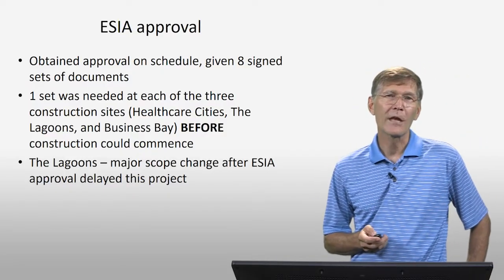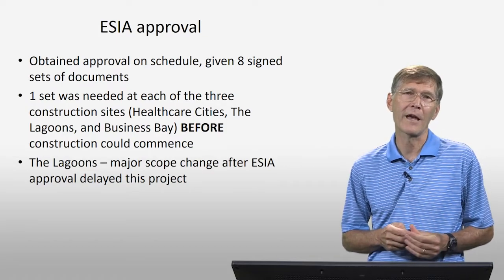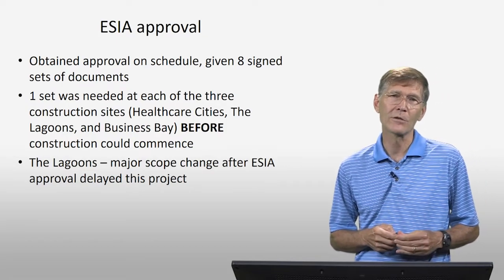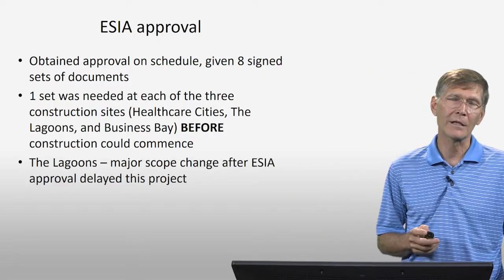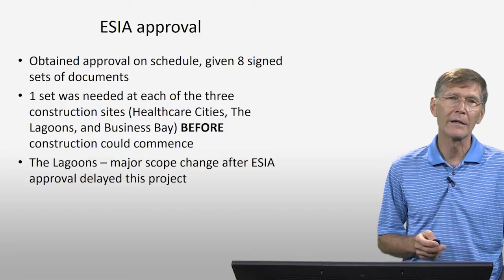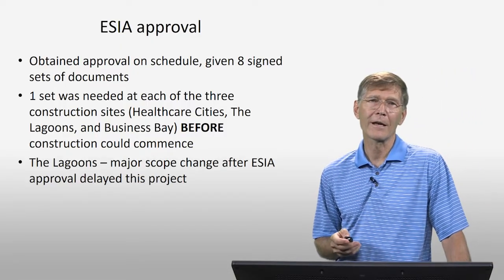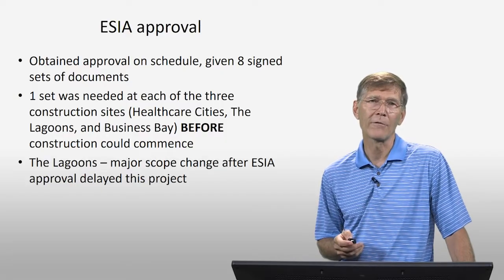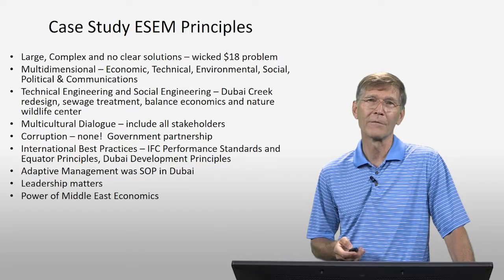And then the lagoons, they had a major scope change after the ESIA. Unfortunately, you don't want that on these projects. You do not want major scope changes, because then you have to go back and get the approval again. And this delayed their project, and I think it's one of the reasons why they had economic challenges. But you want to work with your client and not have any kind of major scope changes after an approval is given by the government. You don't want to open it back up and have to go through it again.